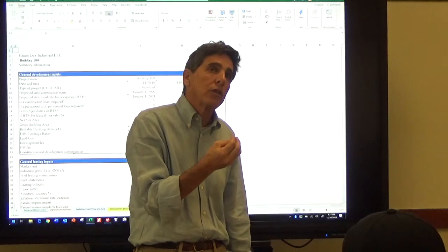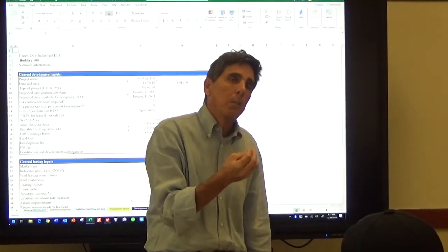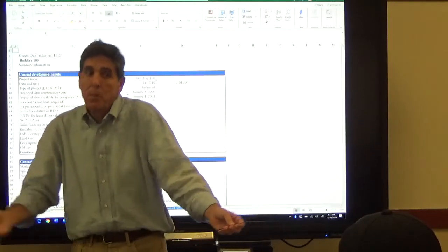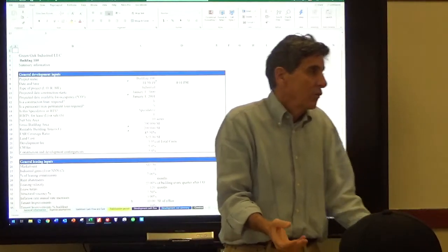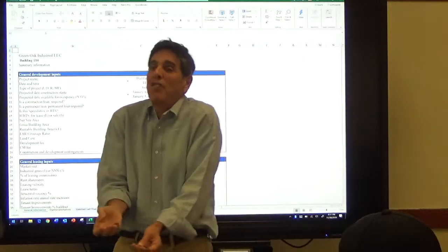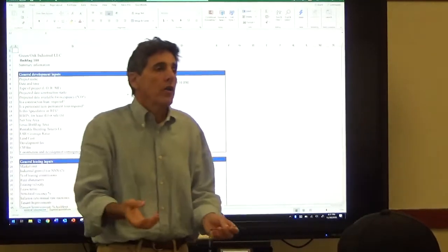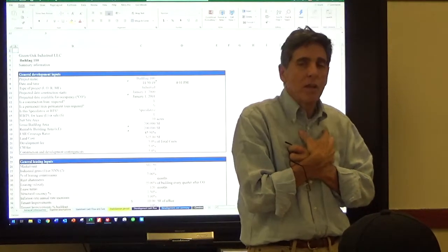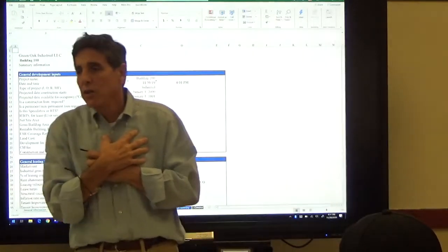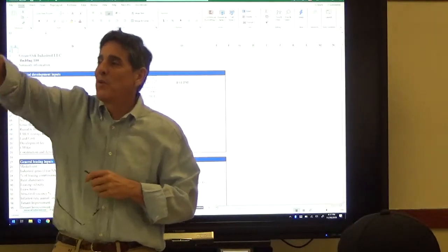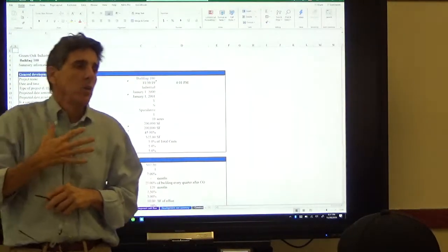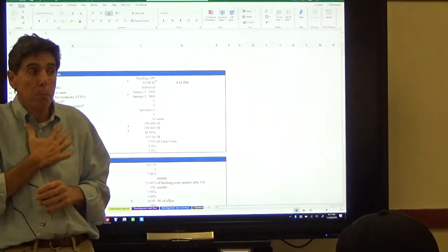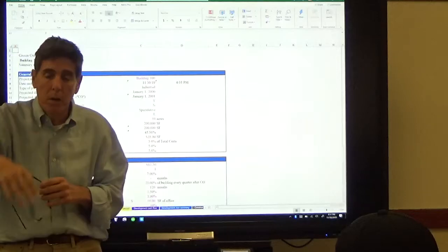Does the soft cost contingency build on the hard cost contingency? If your budget can carry it, yes. If your budget can't carry it, no. So you're going to carry as much contingency as your budget allows. Hard cost contingency is your contingency as an owner. It's not the contractor's contingency. So you don't tell the contractor, yeah, I'm giving you 5% budget overrun. You carry it in case you need it. He doesn't need to know that. That's on your books, it's on your budget, it's not on his budget.